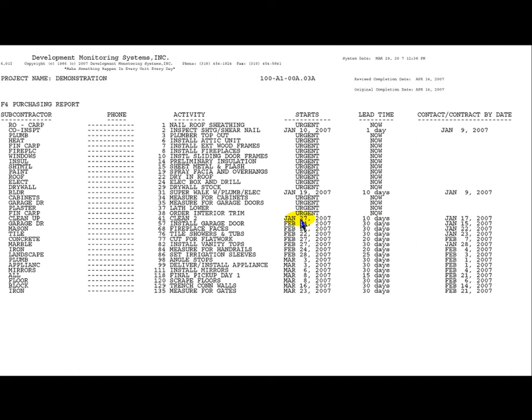to accommodate final contract negotiations and normal sub startup activities. That amount of lead time deducted from the start date provides the required contract date. These dates will be a moving target once the project begins, and the DMS system will adjust as they change.